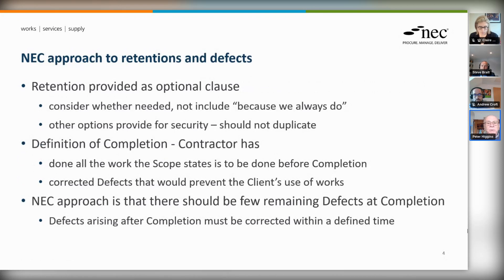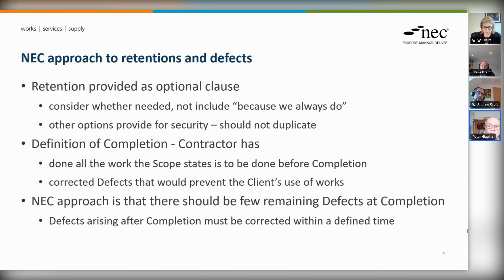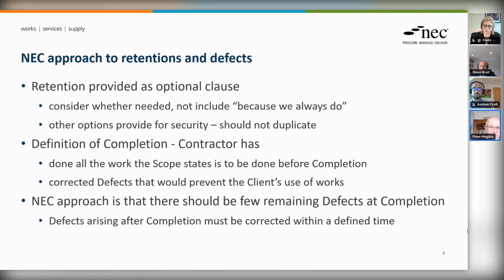The NEC's general approach is that retention is provided as an optional clause — it's not a clause which is there to be used irrespective of whatever simply because it's in the contract. It's there so that people think about it and make a conscious decision that retention is needed: don't do it because we always do, but because there's a reason for needing it. There are other provisions for security, and it doesn't actually make sense to double up on security if you've already got one allowance for it.